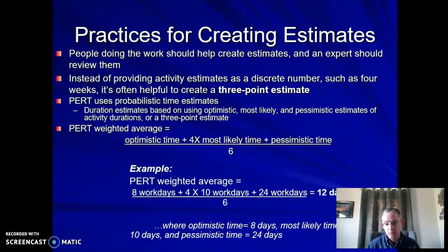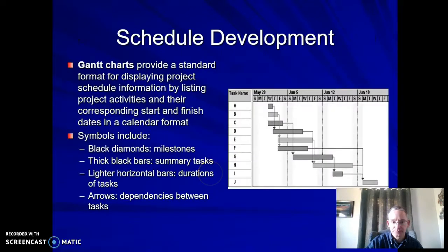So pessimism may say, look, we don't get this permit and it has to take us a whole lot longer. That can be the most pessimistic, but go ahead and add that one in. So you think it skews, but in reality, across the entirety of the project, this winds up estimating pretty well, because for every 4 tasks that go fine, you're going to have one that went really well, and you're going to have one that really went bad. And so at the end of the day, you wind up coming up with some pretty good averages.